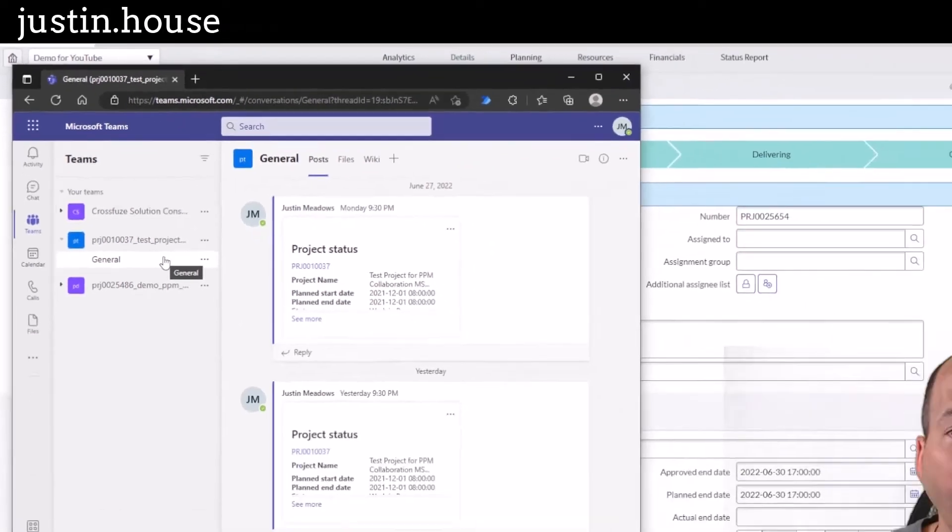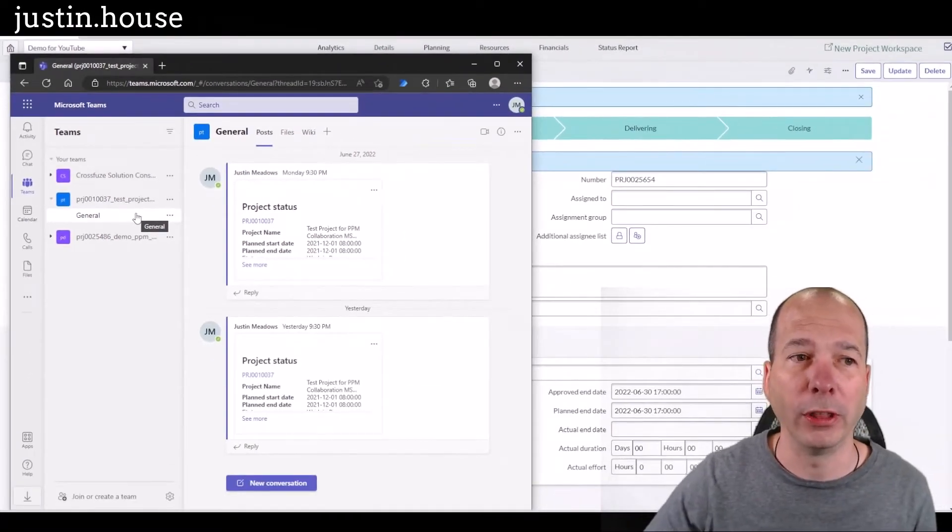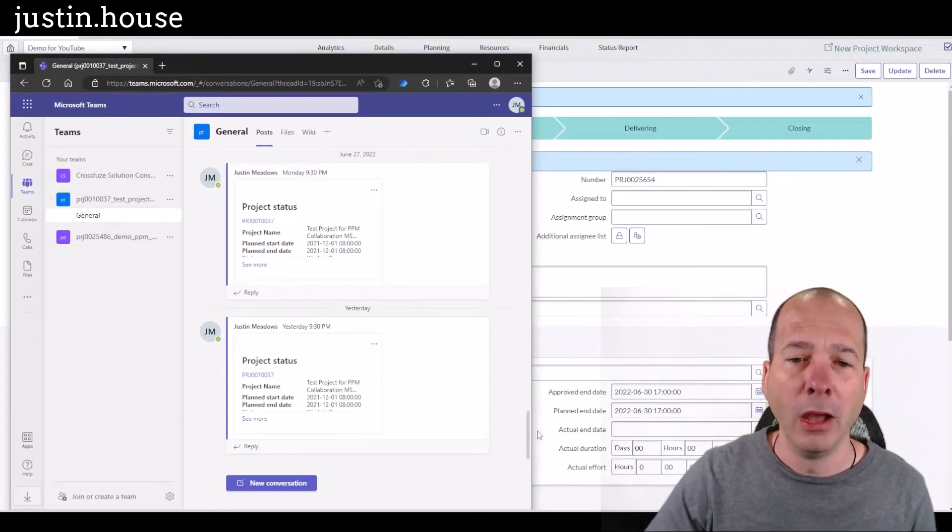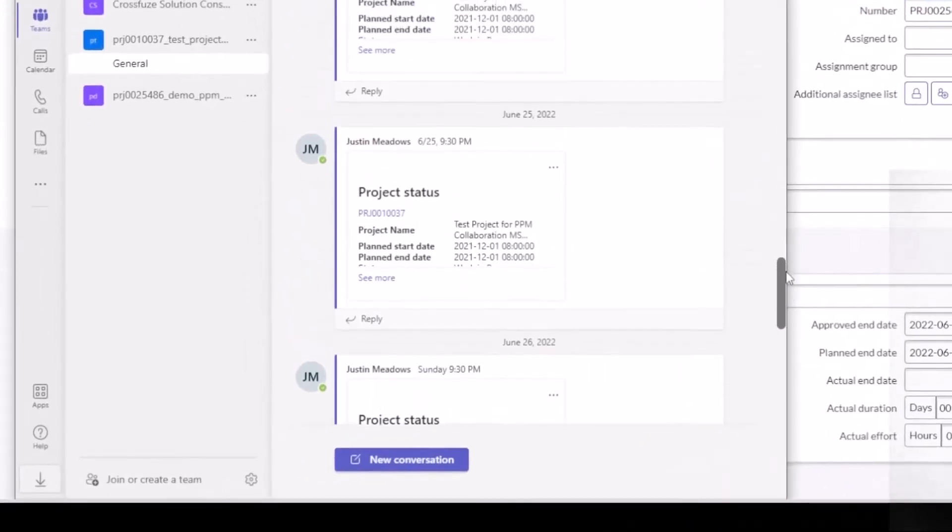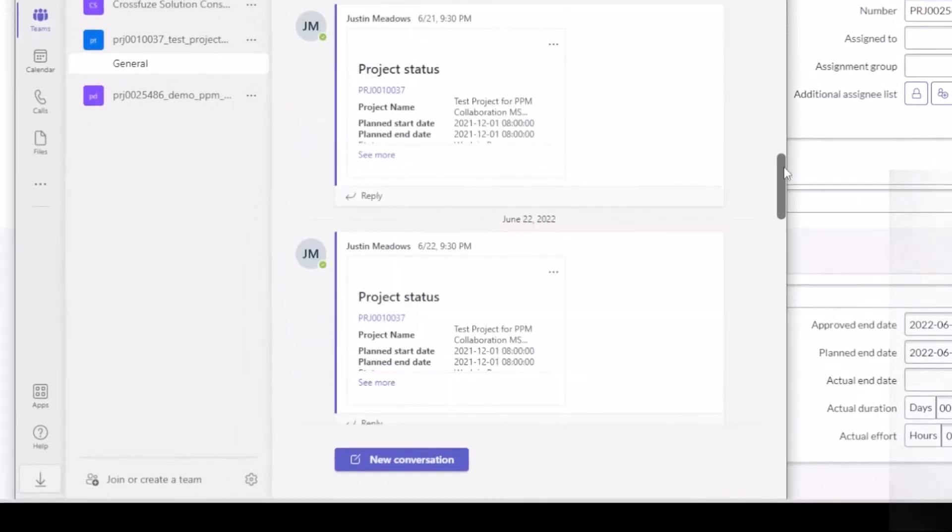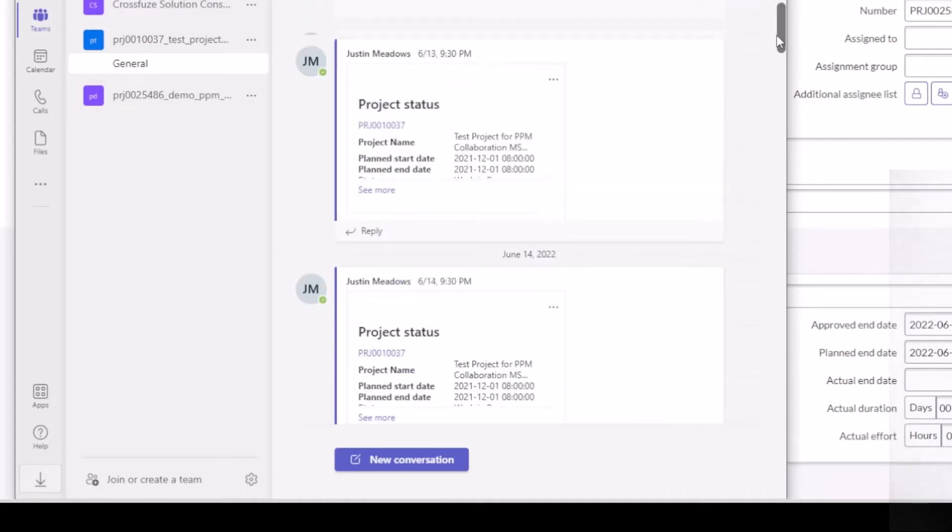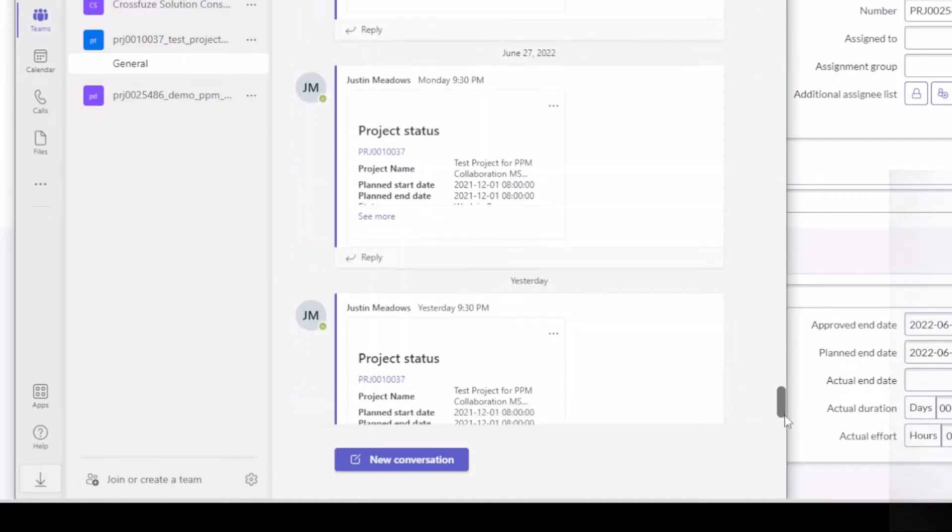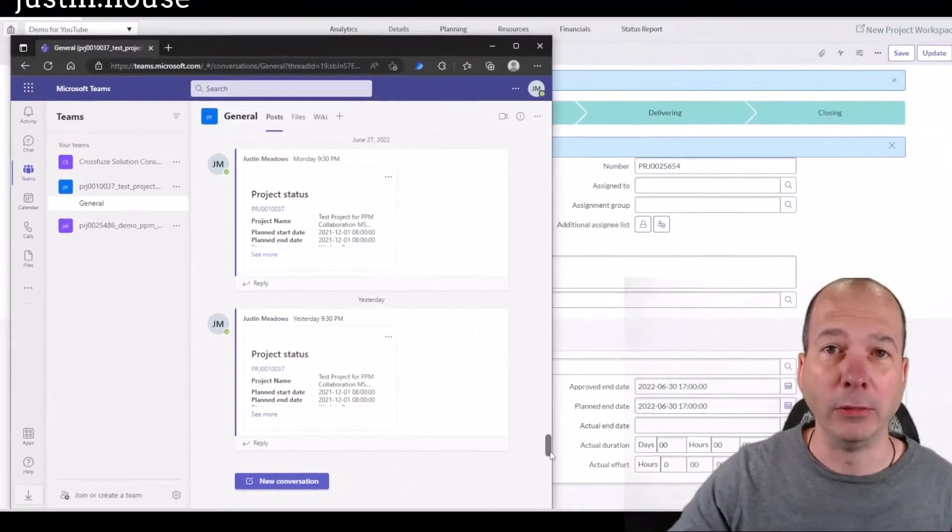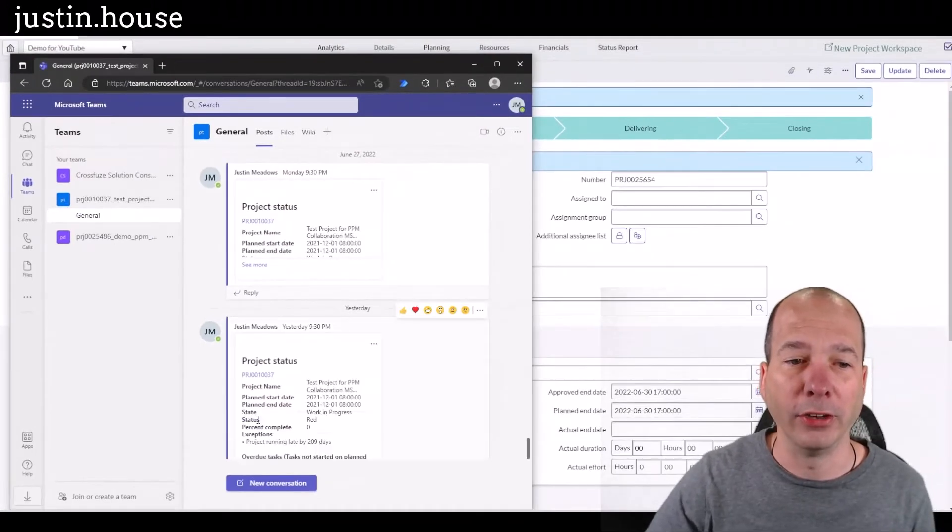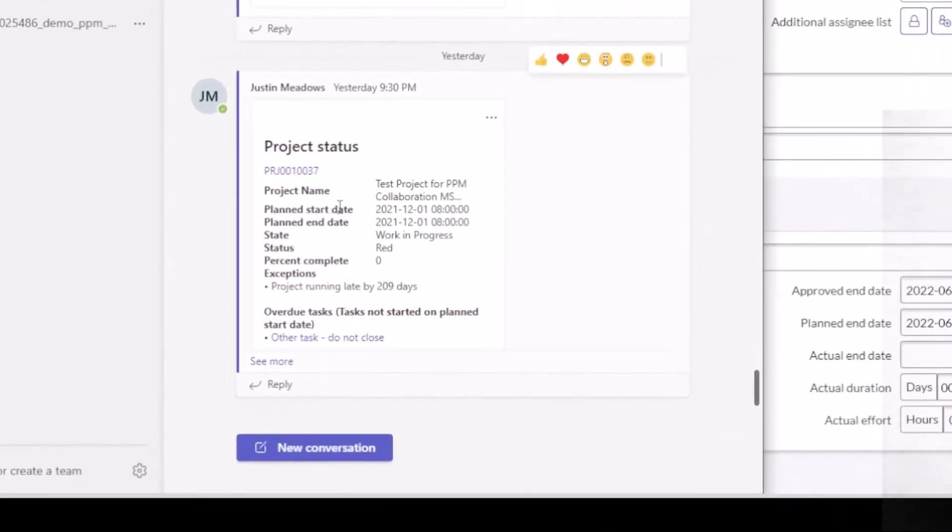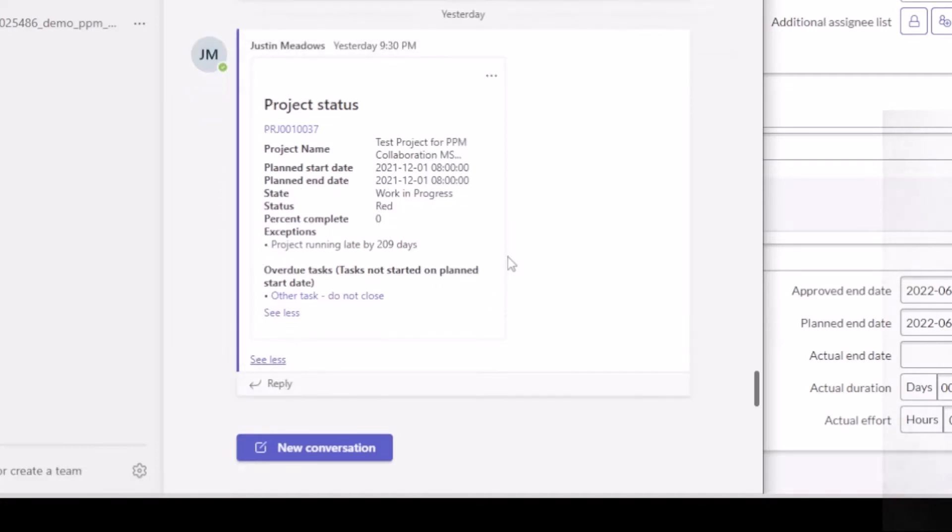While we're waiting, let me show you one of these previous ones that I've set up to make sure it was working. One of the things that's happening is it's sending a daily status report to the Teams channel. So you can see it's been running for a while since I had set it up. And that's just an automated message that goes to the Teams channel and includes the project status. So you see their project name, plan start and end dates, what the state is, the project status is currently red, percent complete, any overdue tasks.